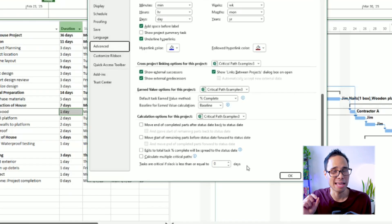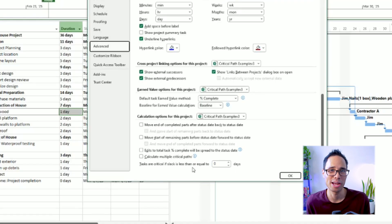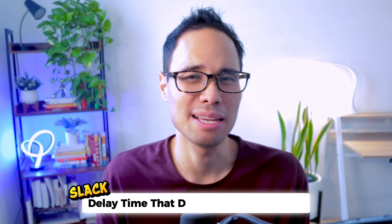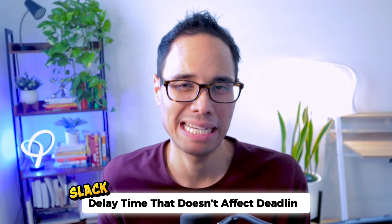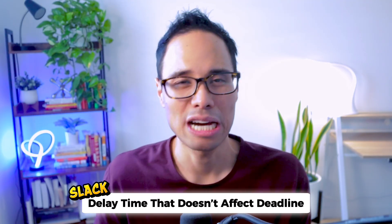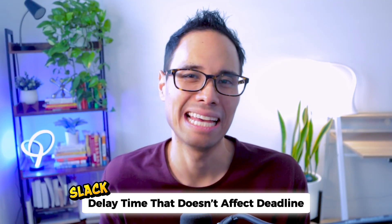Make sure that this number is zero so the software calculates your critical path correctly. If you're not familiar with it, Slack is the amount of time that the task can be delayed without impacting a project's overall end date. A task on your critical path will have zero Slack, meaning there really isn't any wiggle room or Slack for it to get delayed without pushing back a project's finish date. That's the critical path in a nutshell.